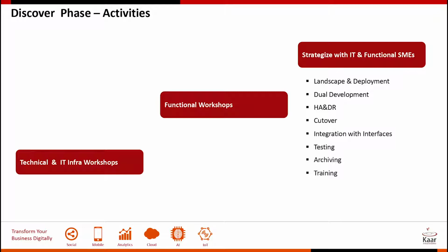If you do that, what really happens is, let's say you have a production break and you want to fix it. You don't have a development system on which you can do the break fix. So we suggest that you leave your production support landscape as is, take copies of your development if you choose not to wipe out your development, or take copies of your production, build a new project landscape, and do your conversions there.